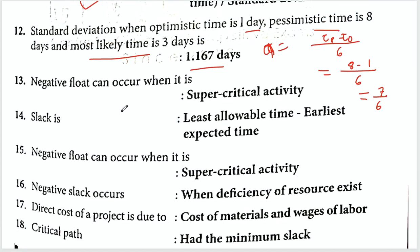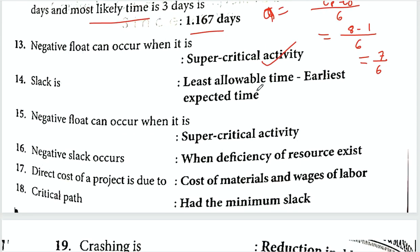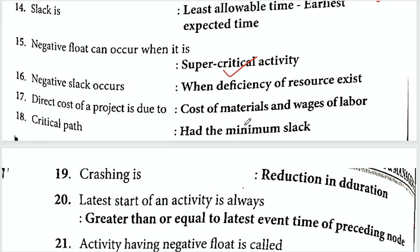Negative float can occur when there is a supercritical activity. Slack = latest expected time minus earliest expected time. When slack is negative, this is called a supercritical activity. Negative slack occurs when there is a deficiency of resources.